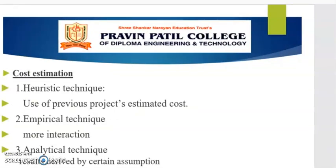This method involves more interaction and communication between those who are participating. The process is as follows: the coordinator represents a specification and estimation form to each expert. The coordinator calls a group meeting in which the experts discuss estimation issues with the coordinator and each other. The coordinator and experts fill out forms anonymously. The coordinator prepares and distributes a summary of the estimates, then calls another group meeting. In this meeting, the experts mainly discuss the points where their estimates vary widely, and the experts again fill out forms anonymously.